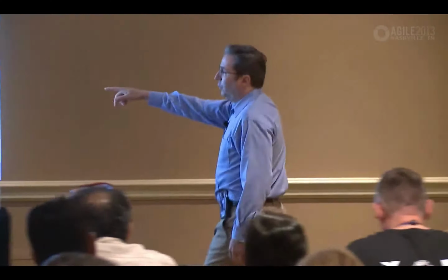It might have. So the comment was, what if we hired more people? I made the observation that maybe we would have to hire more people if we wanted to put an artist on each team. Her comment is, wait a minute, why don't I just hire more artists and put them on the art team? Fair. So once again, we could look at both models and say, if I added 2 more artists to the art team, what does that do to lead time in terms of the art? Does it take it from 6 weeks to 4 weeks? That might be a good move.